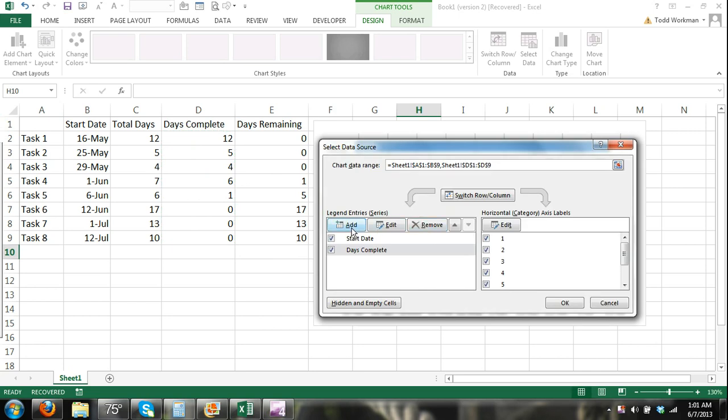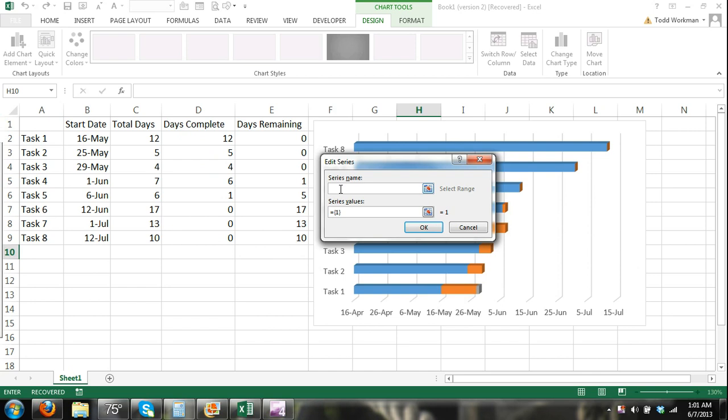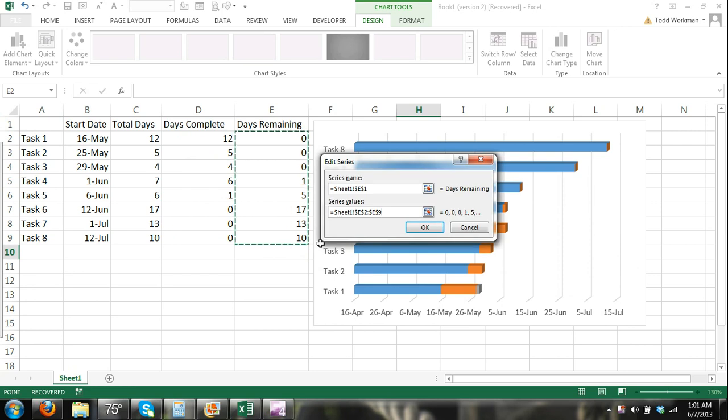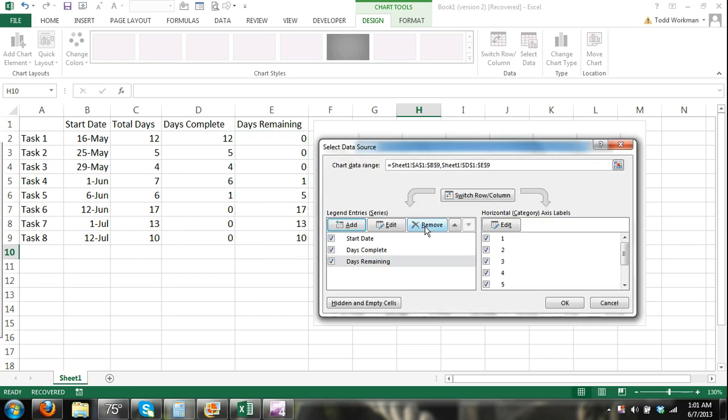And I have one more to add and that's days remaining. Click on days remaining and for series values, click ok. So I have my three series for the bars: the start date, days complete, days remaining.